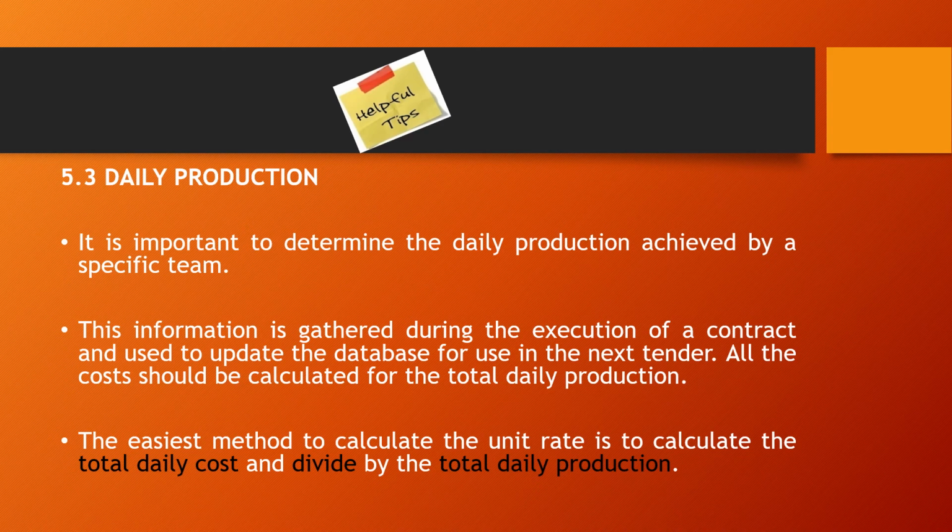Have a record, have a journal of each job. If you do a job, have a record of how long it takes you to excavate, how long it takes you to lay the pipe, how long it takes you to backfill, how long it takes you to pour concrete, how long it takes you to do ABC. Put all of that and keep it in a file. That information, you use it for other tenders.